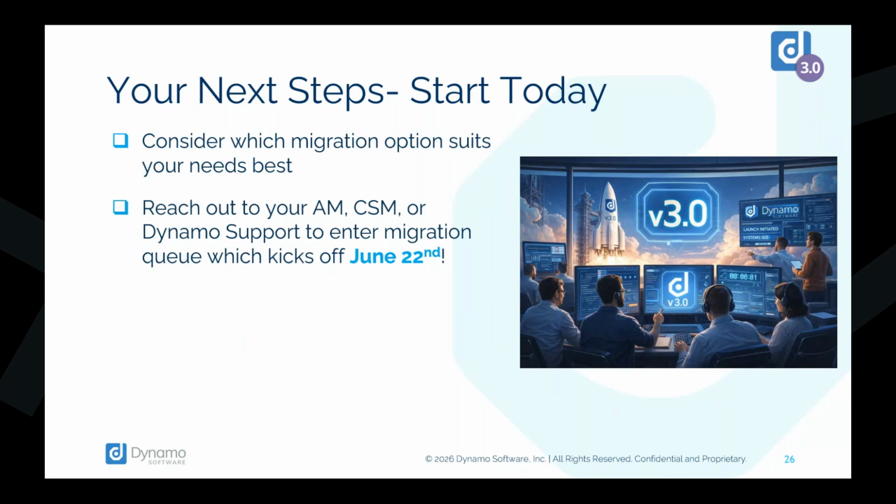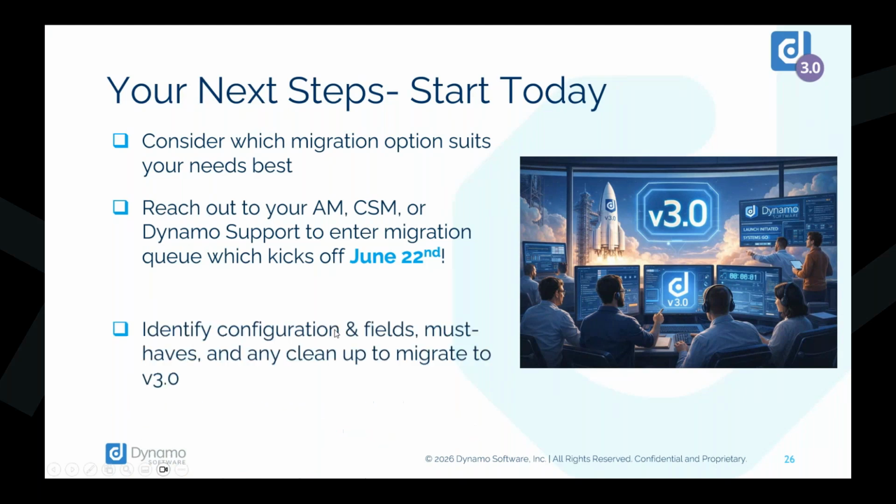If you want to do a premium migration, those will not align with the 2-week schedule. We'll basically plan out that project and assess the schedule based on your firm's needs and how much is involved in the 3.0 migration. It'll depend on things like how many modules you use, how customized they are, and then we'll come up with a project timeline that best aligns with your firm.